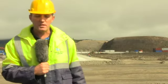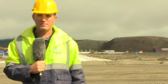Timeline for completion of the airport is February 2016, but for the earthworks, the end of this year. The dry gut, like I said, will be finished by the end of August, if everything goes well, weather permitting, plant and machines permitting. The runway excavation will take a little bit longer because the dry gut is obviously our first priority. After that, we'll have to get the whole of the runway excavation on level and clear and safe before the machines can go back to South Africa.